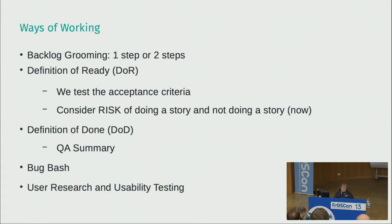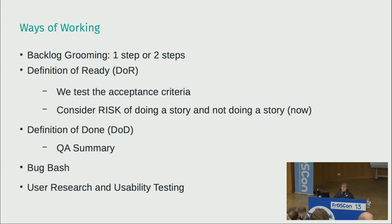For our ways of working, we found that backlog grooming is really important — prepare a story before it goes into a planning meeting. It's best to do grooming in a two-step setting: first, designers with maybe one QA, one developer, and the PO prepare the stories and do all their discussions. Then once it's pretty ready, you go into a second session where you really define all the acceptance criteria so the story is ready when you go into planning. Once the story is done, you have a definition of done, which I'll show on further slides.